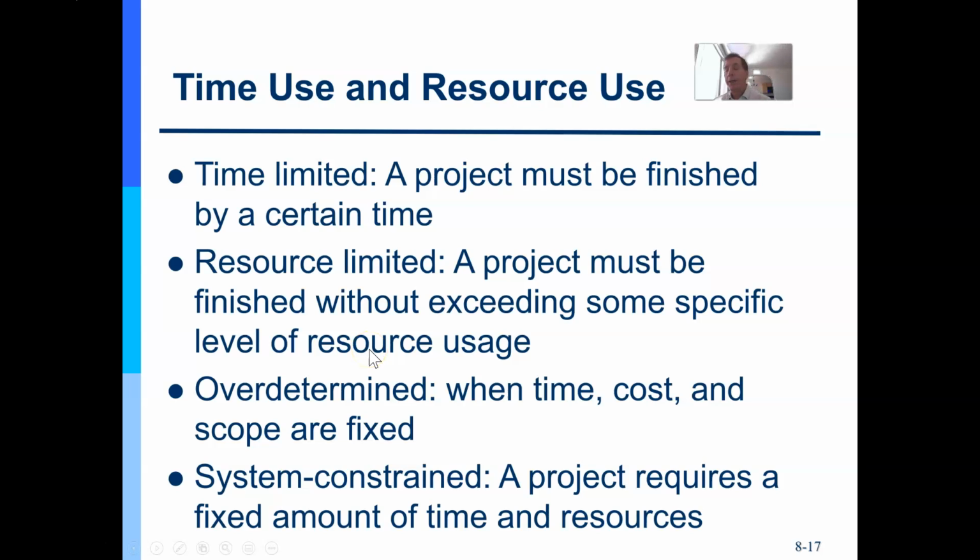And sometimes the iron triangle cost might be fixed. So all you have is schedule and scope. And a reduction in cost would mean reducing scope or schedule or both also, right? So there's this triangulation between them, between schedule, resources, cost, and scope.